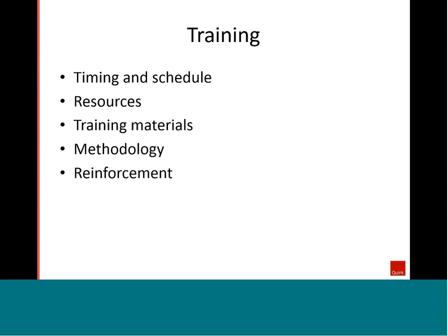And then scheduling is something that you probably want to start working on several weeks in advance, especially when you're thinking about training providers, because you want to be able to block their schedules without affecting your patient flow. And then identifying what resources you need to have in place. Are you going to be doing the training in-house? Are you going to be relying on some outside resources, making sure that they'll be available when you need them to be?